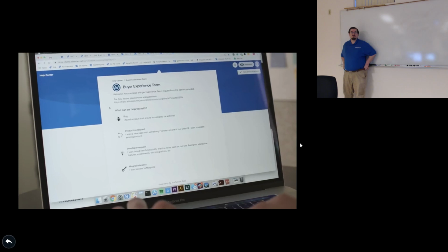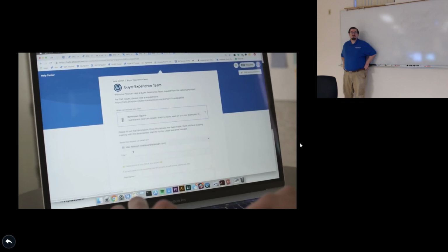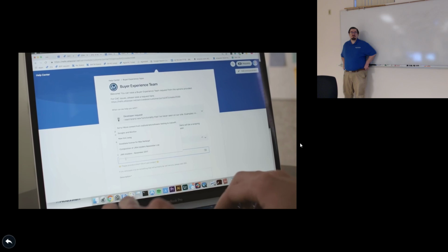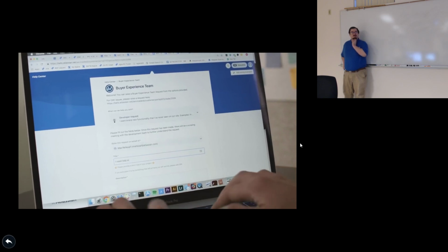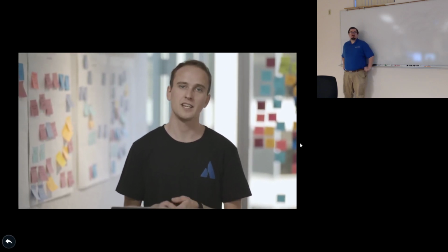So how and when do you create these Kanban cards? A lot of Kanban teams are service teams, like IT or help desks. They choose Kanban for the ability to continuously start new work and continuously deliver work. These teams oftentimes have service desk software, something like Jira Service Desk, where their customers, both internal and external, can create tickets for the team based on their needs. Those tickets are automatically turned into Kanban cards that the team can pull into their workflow when they're ready.